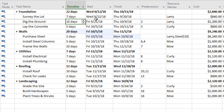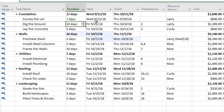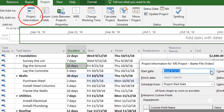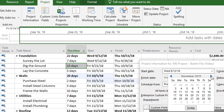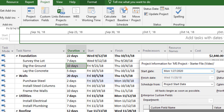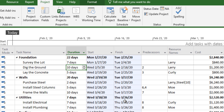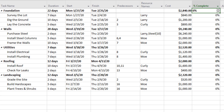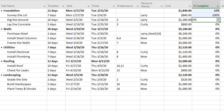I notice the project is currently set to start on September 12, 2018 — that's over a year and a half ago. I'll go to the Project tab, click Project Information, and change the start date to January 27, 2020. Because predecessors are built in and activities are auto-scheduled, Microsoft Project will adjust all the activity dates appropriately. As the project gets underway, I can also add a Percent Complete column to designate how much of each activity is finished.